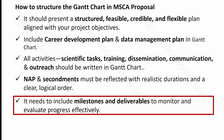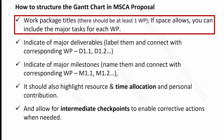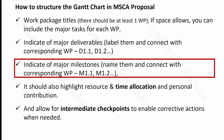Include milestone deliverables to monitor and evaluate the progress of your proposal — they should be written in a way that can be evaluated. In the structure of the Gantt chart, include work packages with a short title. Indicate deliverables with short abbreviations like D1, D2 and connect them with the work packages. Similarly, indicate milestones like M1, M2 and connect them with the work packages.